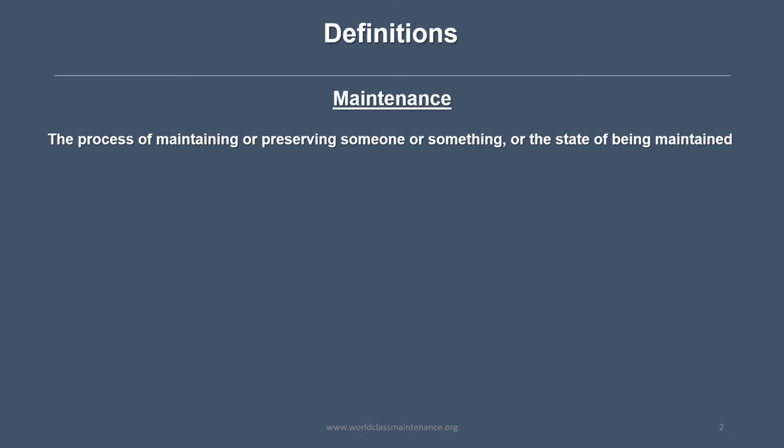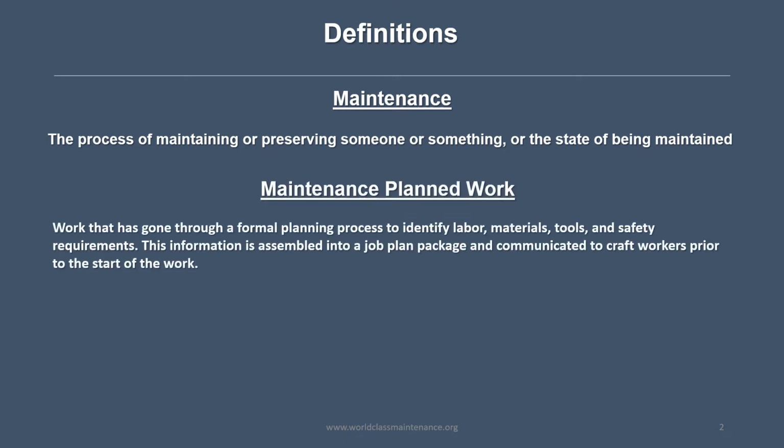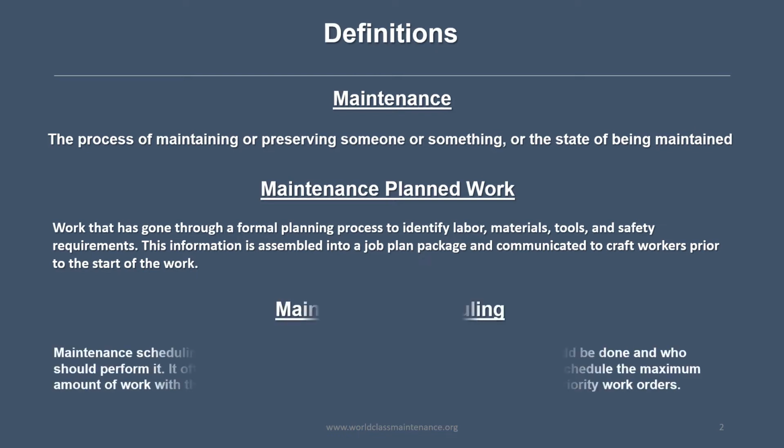So maintenance: to maintain, keep, preserve, protect from degradation. Maintenance plan: work that's gone through a formal planning process to identify labor, materials, tools, and safety requirements. This information is assembled into a job plan package and communicated to craft workers prior to the start of work.